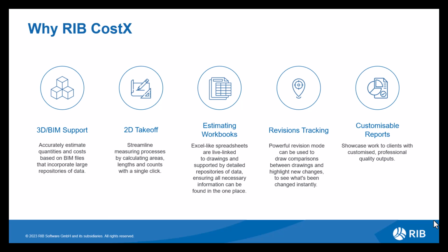We then have revisions tracking. Now this offers an accurate method of comparing a previous version with a new one, giving you multiple ways to highlight, identify and quantify any changes, meaning you're always up to date with the latest cost implications. Once you've completed your estimate, you then have the opportunity to produce a report. Now we offer various standard report templates for you to use. Alternatively, you can customise your own report, producing a professional quality output.